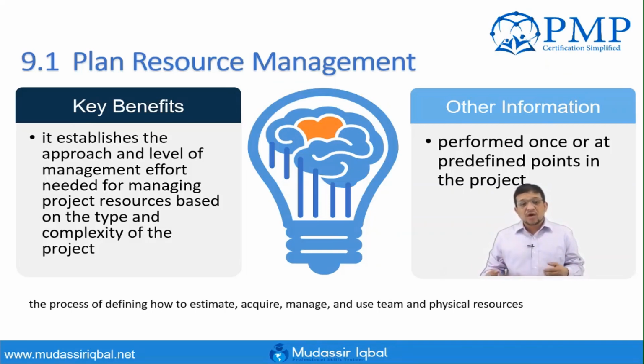So here, obviously, we will use standard templates for the hiring of resources, creating the project plan, resource breakdown structure, and RACI chart. All those we will be needing, and then we will be tailoring them as per our requirement. Plan Resource Management is the process of defining how to estimate, acquire, manage, and use the physical and human resources. So we are here talking of both resources.